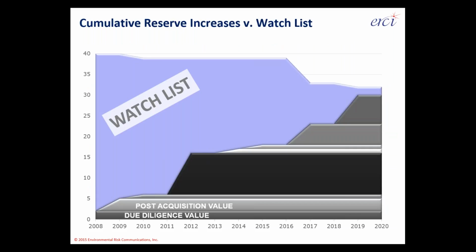And so again, helping anyone who's involved in good capital stewardship with you, they'll want to know where the spending's going and what it's achieving, and just tracking actual spending isn't enough. Tracking where the reserves have come in and the watch list has gone down is another one of those metrics that helps describe where the money is going and how that new understanding, that incremental knowledge, adds value to your enterprise.